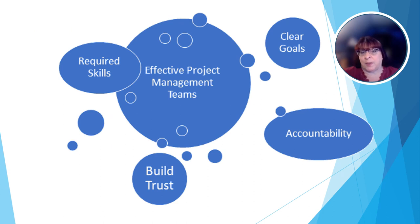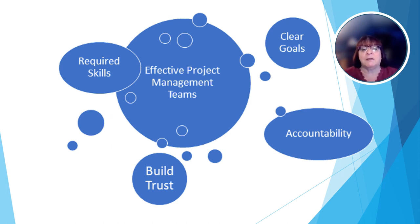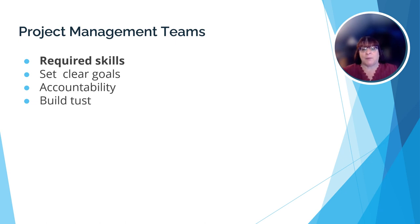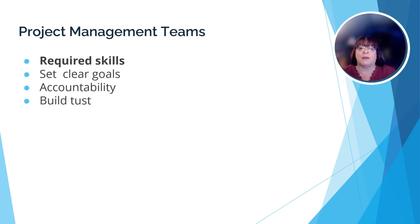One of the most important duties of a project manager is to build an effective team. There's a lot that goes into building a team: finding people with the required skills, understanding the goals of the project, and building trust and accountability. Every member of the team must have the skills needed to complete the project. That isn't to say that all team members start at the same time — if a skill set isn't needed until the last quarter of the project, that team member is likely more useful someplace else until their skills are needed.